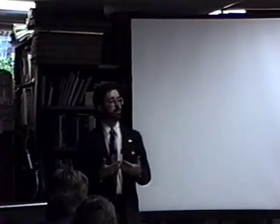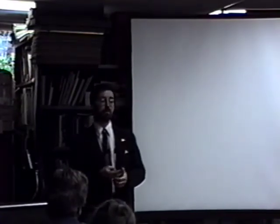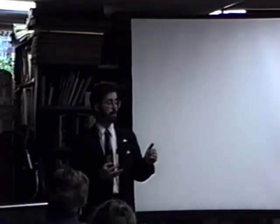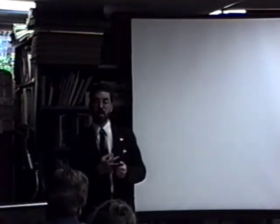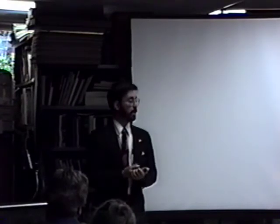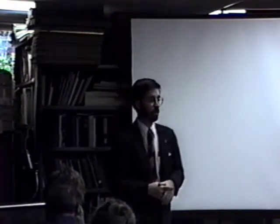And the interior phase that we're entering into, we've broken it down into three phases. First phase is the demolition work. Second phase is finishing the structural and putting in a mechanical system. And third phase is dealing with interior finishes, paint and plaster and wall and carpets, that sort of thing.